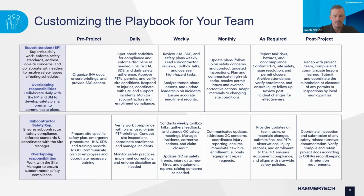Also, part of this is taking a look at your current contracts and your contract verbiage. You really want a process for accountability if and when things get off track from a project level. So have a discussion around what's currently there and what needs to be there. Again, you want to make it actionable. Make sure your team is fully aware and that it's communicated to any subcontractors that you have. Additionally, the project team has to be willing to withhold payment if it comes down to that. Otherwise, it's really hard to get back on track when there aren't any consequences for not making corrective actions.